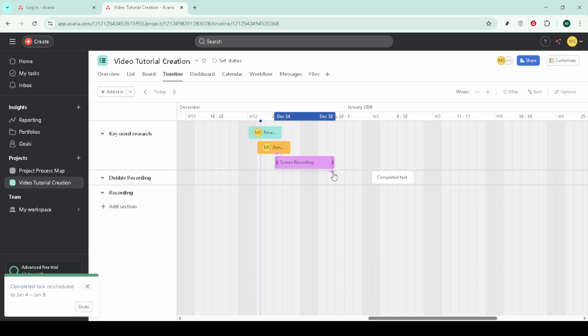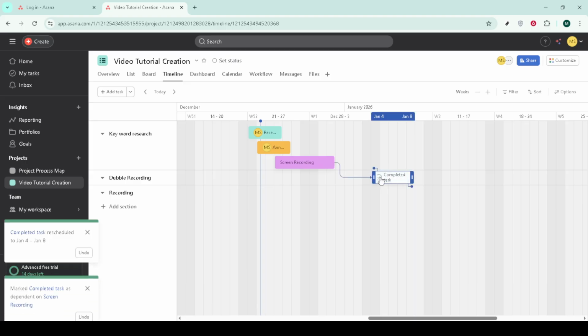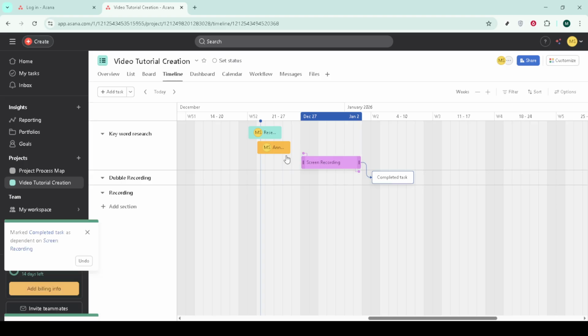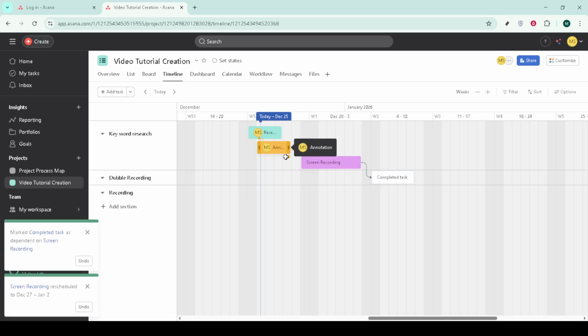For teams that rely on dependency logic, open timeline options to manage dependency date shifting. This setting controls whether related tasks automatically move when you reschedule their predecessors, helping you keep plans aligned with one quick change. Anytime you need more context, click a task to open its details pane.